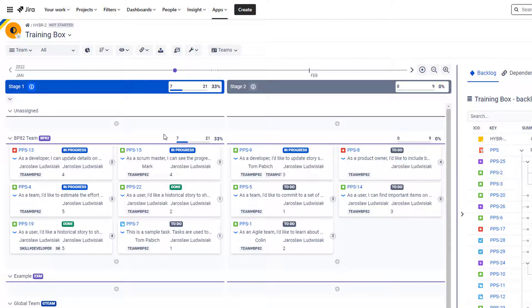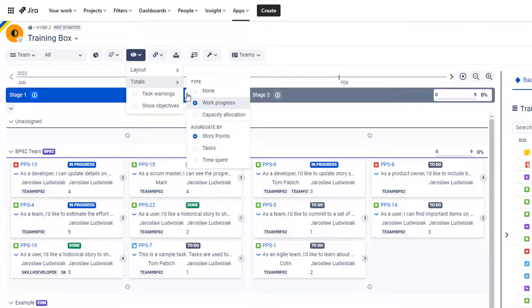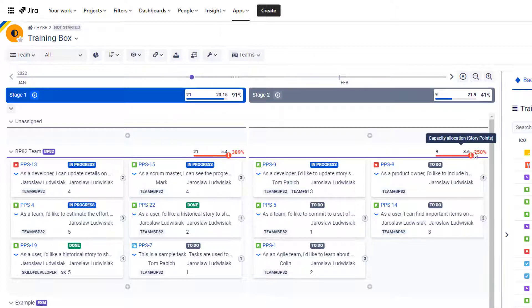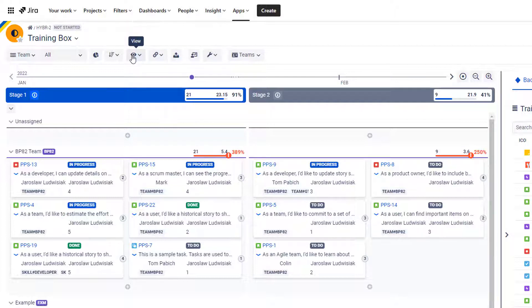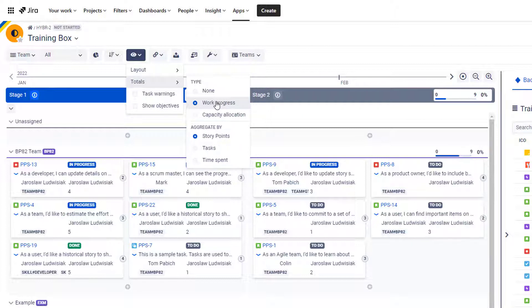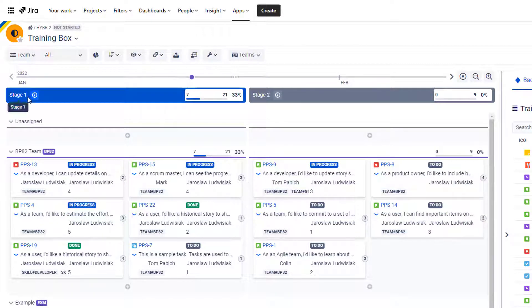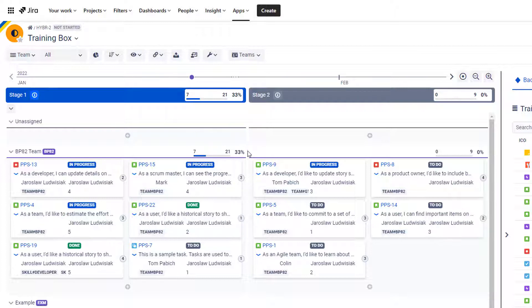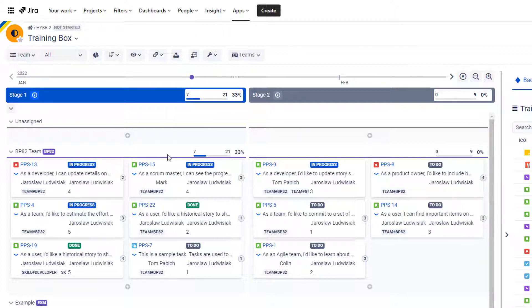These indicators are called totals and you can switch between work progress and capacity allocation. Capacity allocation should be used when you're planning — for example for stage two I can turn it on and see the team is highly overbooked with the tasks assigned. If I switch to work progress, I can see how much of a stage has already been completed. You can look at it in hours, man-days, or story points. I've left story points here because it's probably the best fit for agile, though hours or man-days are totally fine too.